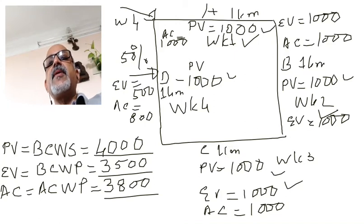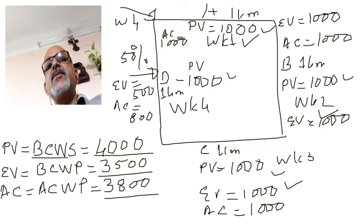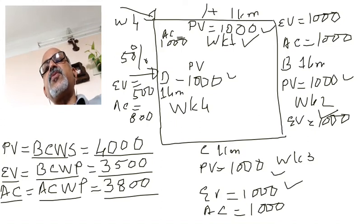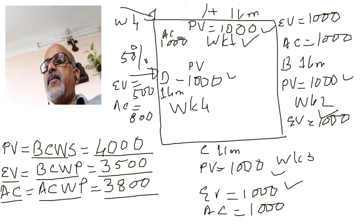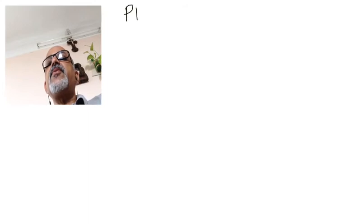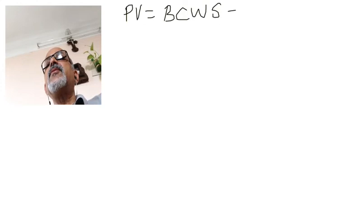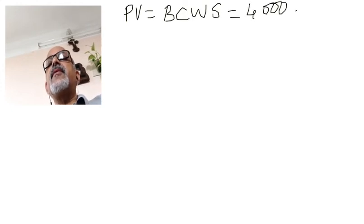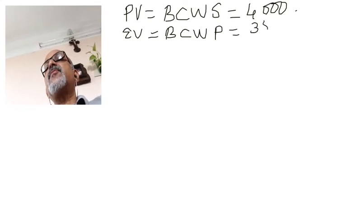So what are we saying here? We planned for work worth $4,000 in four weeks. Out of that we completed work worth $3,500, and for that we incurred an actual cost of $3,800. This explains the basic building blocks of Earned Value Management: Plan Value (BCWS) = $4,000, Earned Value (BCWP) = $3,500, and Actual Cost (ACWP) = $3,800.